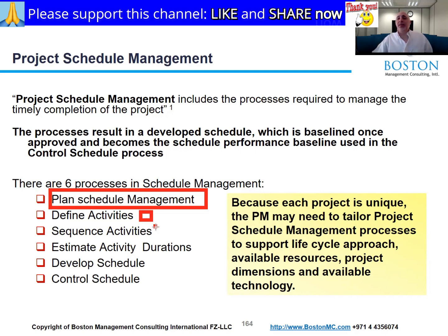And then once you identify the activities, you can connect them in the right order. Which one has to happen first, which one is next. And even when you have activities coming, hey, my hands are like WBS packages, right? And the fingers are the activities. Sometimes you'll find that one finger here is going to connect or maybe needs to finish before another activity here on a different WBS needs to happen. So I will take information from the team lead here and then the team lead here, and then I will connect the activities in the proper order so then I can stay on top of it, right?